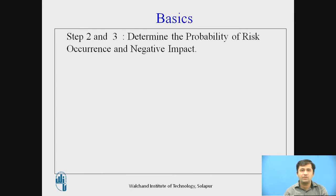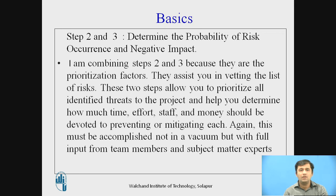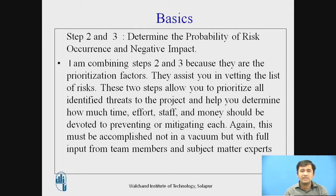Step 2 and 3: Determine the probability of risk occurrence and negative impact. I am combining Step 2 and 3 because they are prioritization factors. They assist you in vetting the list of risks. These two steps allow you to prioritize all identified threats to the project and help you determine how much time, effort, staff, and money should be devoted to preventing or mitigating each. This must be accomplished not only in vacuum but with the full input from team members and subject matter experts.